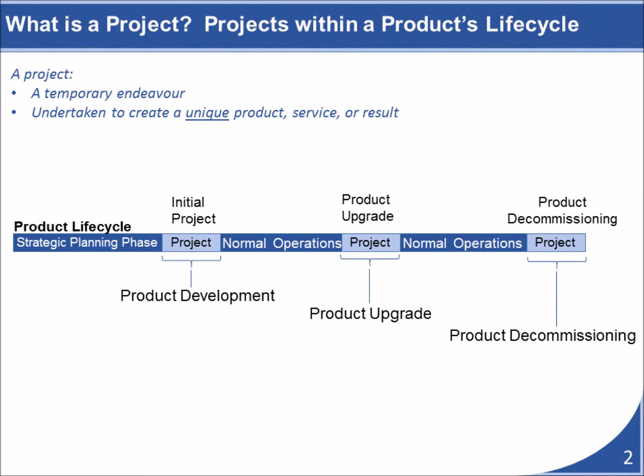But later on, the product that we produce might need to be enhanced or upgraded. This requires another temporary and unique endeavor that would be considered a project. Everything that we do that is a unique undertaking, including shutting the product line down, would be considered a project and would involve activities that are very different from the organization's normal operations.